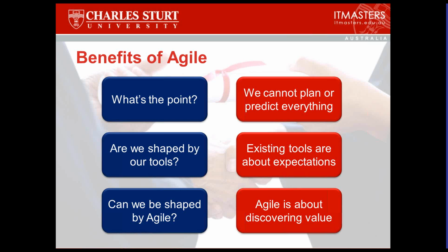Agile contracts, yes, they work very differently, and they have to work from the position of defining and accepting 2 things. Firstly, that the exact definition of the outcome is sufficiently variable that we can still meet the contract even though we've delivered something a little bit different from what everyone thought we were going to deliver. But we can still meet the contract because we have in the contract stipulated an appropriate process for making sure at suitably regular intervals that we are incrementally building value that is incrementally acceptable to the person paying at the other end.